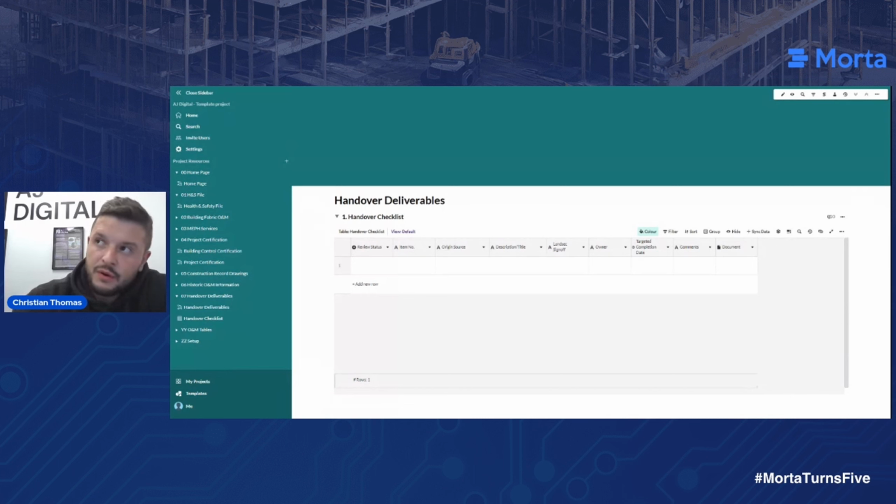There is a review workflow that's separate from the O&Ms, where the client can then sign it off, so it's been witnessed, it's not going to be changed, and then there is assurance being provided to the client agent, project director, that information is indeed being signed off, and we're looking likely on a particular date to be able to legally hand the building over.